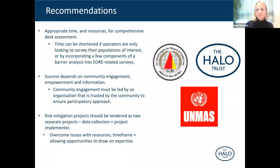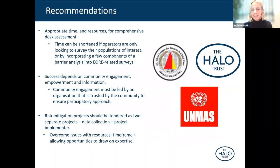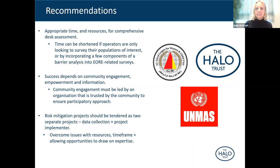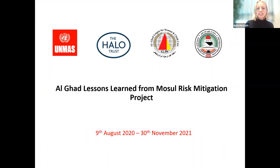Despite the challenges, the project was a huge success — an impressive 76% of all adolescents involved in the end line said that they visited the park. My main recommendation is that the risk mitigation project should really have been tendered as two separate projects: a data collection exercise and then a project implementer. This would have helped reduce the challenges during the park's construction. Key recommendations include: allow appropriate time and resources for comprehensive desk assessment; ensure community engagement is led by an organisation trusted by the community; and tender risk mitigation projects as two separate phases.